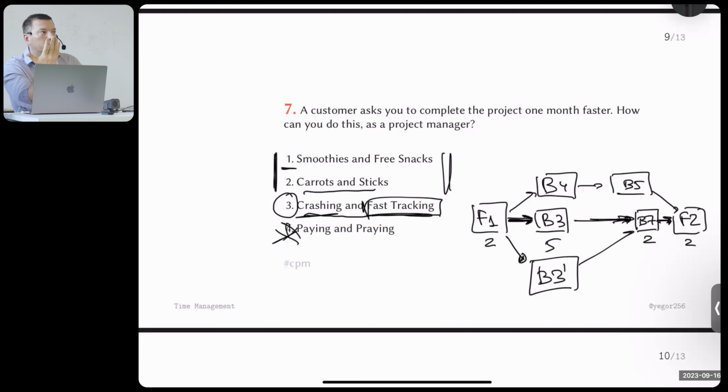And every time you go back to the customer and say, you know what, you give me more resources, you pay more salaries for programmers, so the budget will go up, but the timeline will be shorter and shorter. And the customer will accept it, or they will say, no, I understand it's more expensive, so get back to the original baseline. So don't change the baseline.